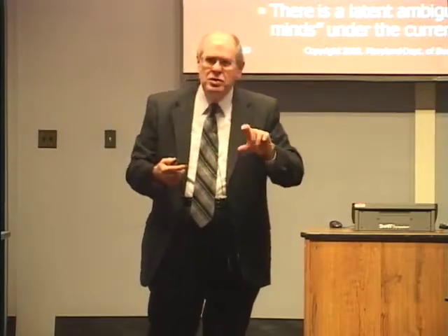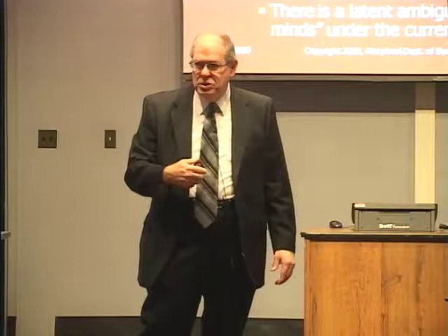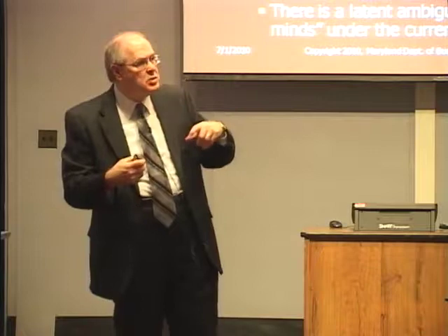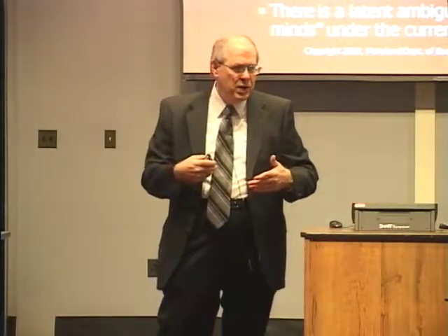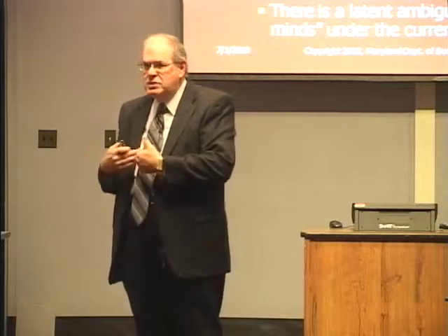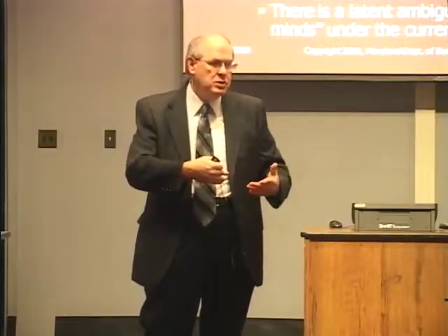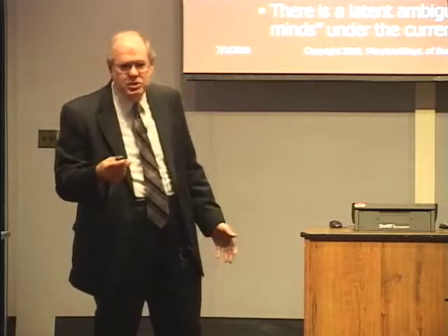If there is this hidden or latent ambiguity, the rule is the interpretation of the vendor is the interpretation that will prevail if this goes to the Board of Contract Appeals or beyond that to a court. So that's why if we make a determination that there was a latent ambiguity, then there's more leeway in what we can agree to in a modification, because we know that if there were a claim, that would be the interpretation of the Board of Contract Appeals, which means we'd lose anyway. So if we figure out we're going to lose anyway, that's a reason to come to a mutually agreeable modification, to perhaps pay some money to get out of the ambiguity. But hopefully we don't have many situations where we have that.